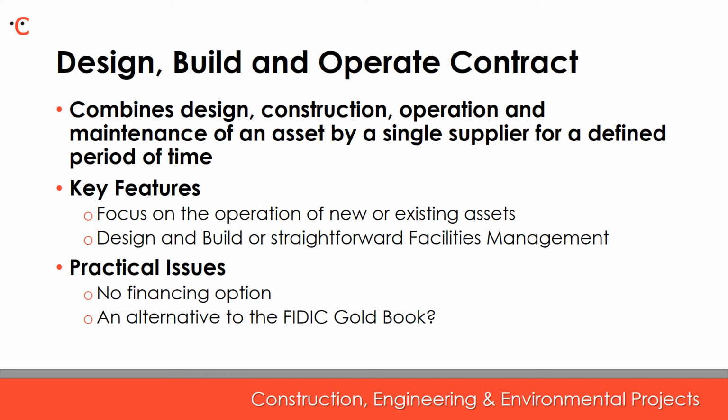The contract further recognises greater involvement, input and responsibility of the contractor during the operational phase, with payment being split into Part A, allowing for construction as a series of lump sums and service as periodic payments, together with Part B, which allows for target share by reference to pre-agreed performance tables.